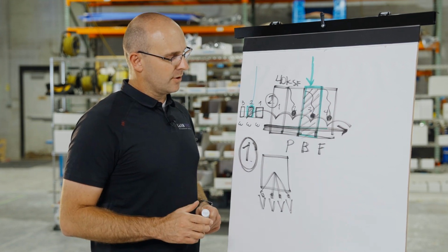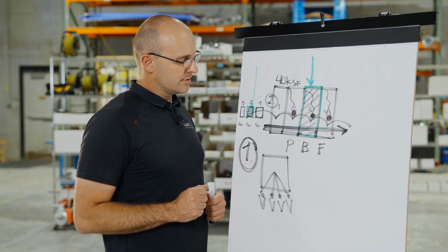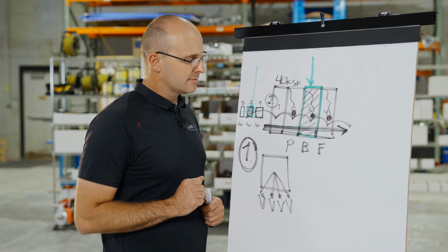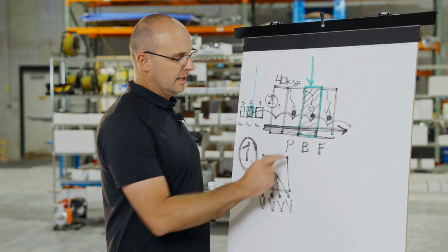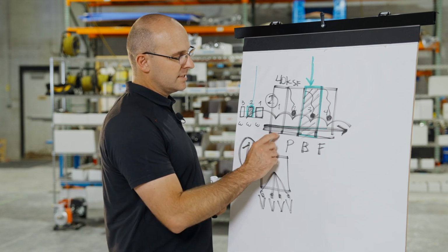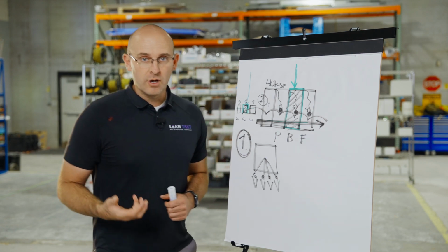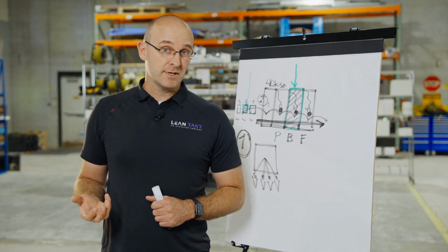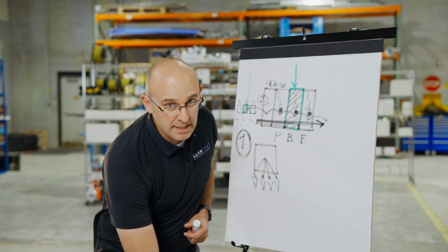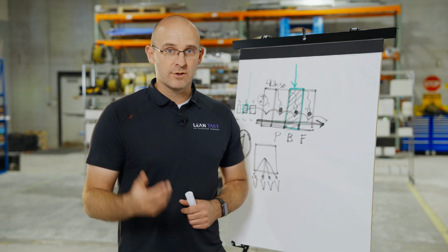So if you as a trade partner, as a foreman, when you're doing your walks, if you see a problem with people's understanding of the plan, if you see we're not all going the same direction, you see we're not in the same sequence, if you see a slowest trade, if you see a slowest zone, if you see not everyone's going the same speed, if you see that we are not the same distance apart within those zones, those are all triggers to say, hey, there's probably a problem here. So I hope that's understandable and you can use that in the field. Take notes, again, on your schedule and according to your zone maps if you see any of those circumstances.